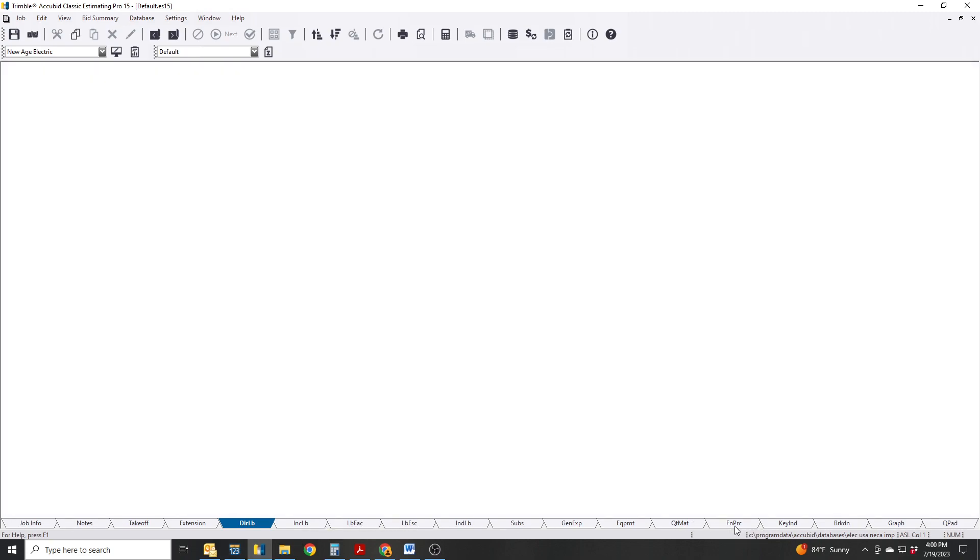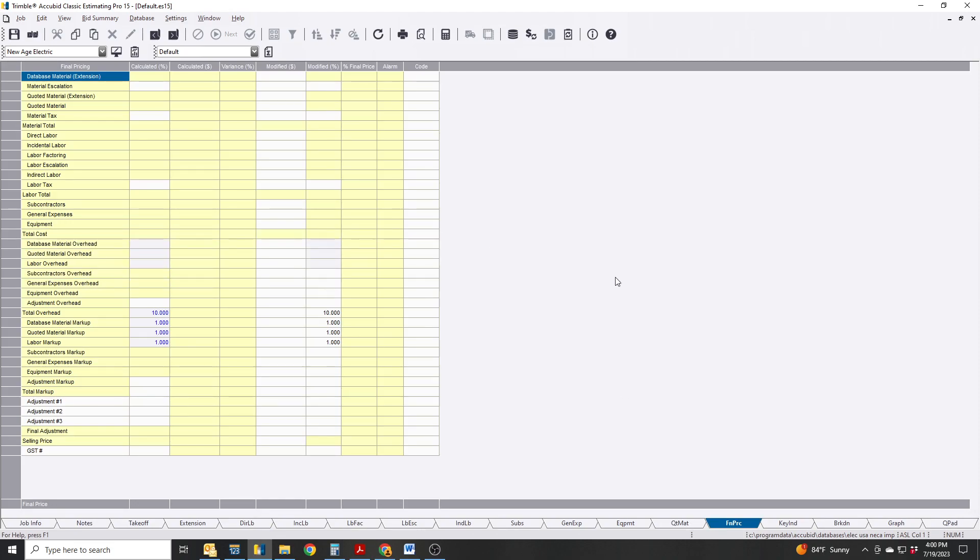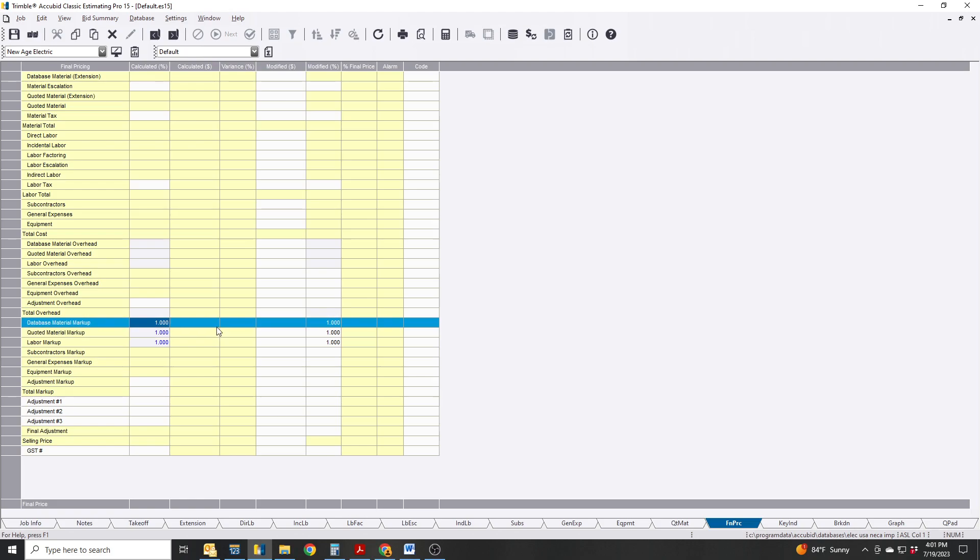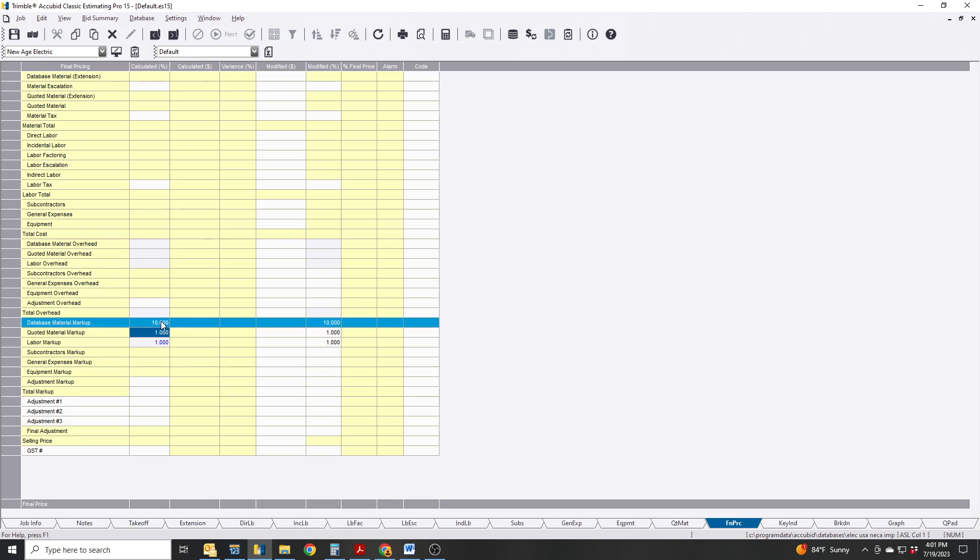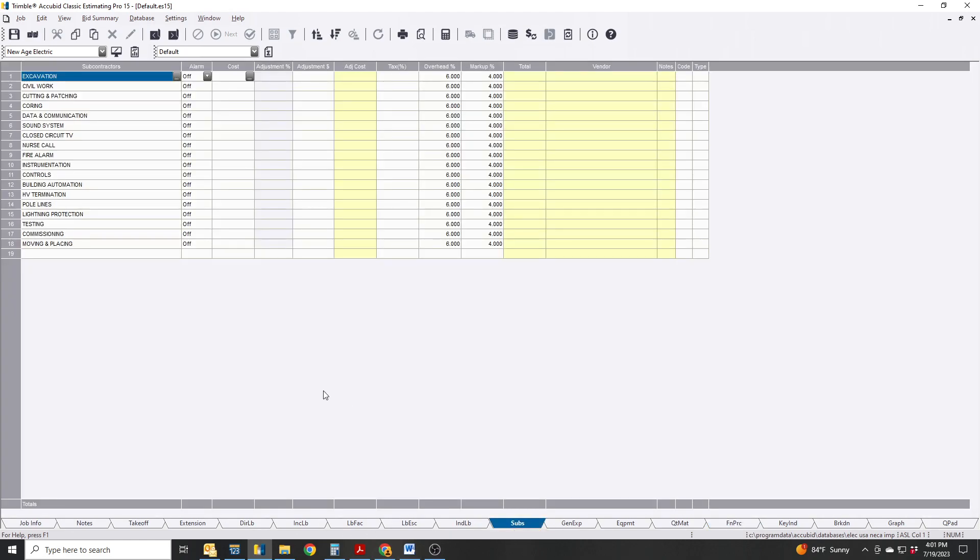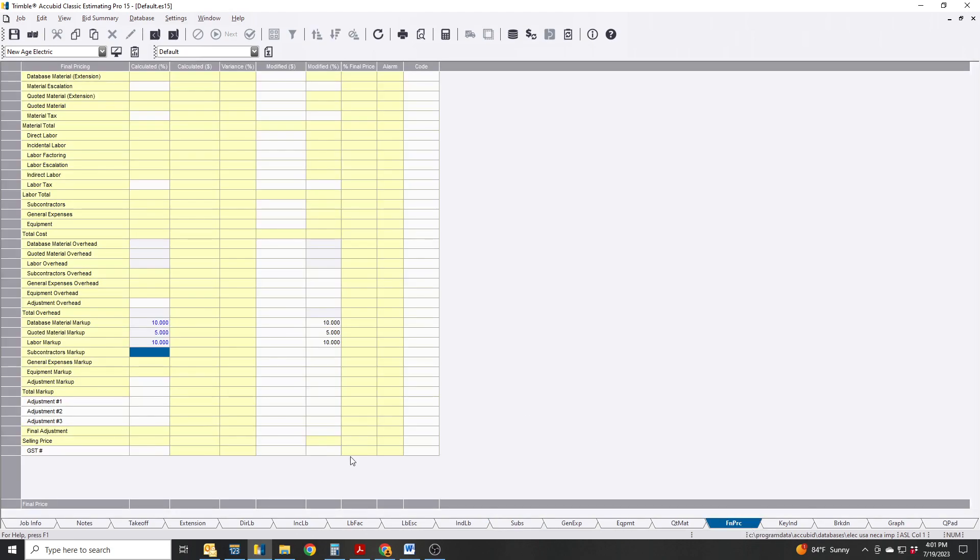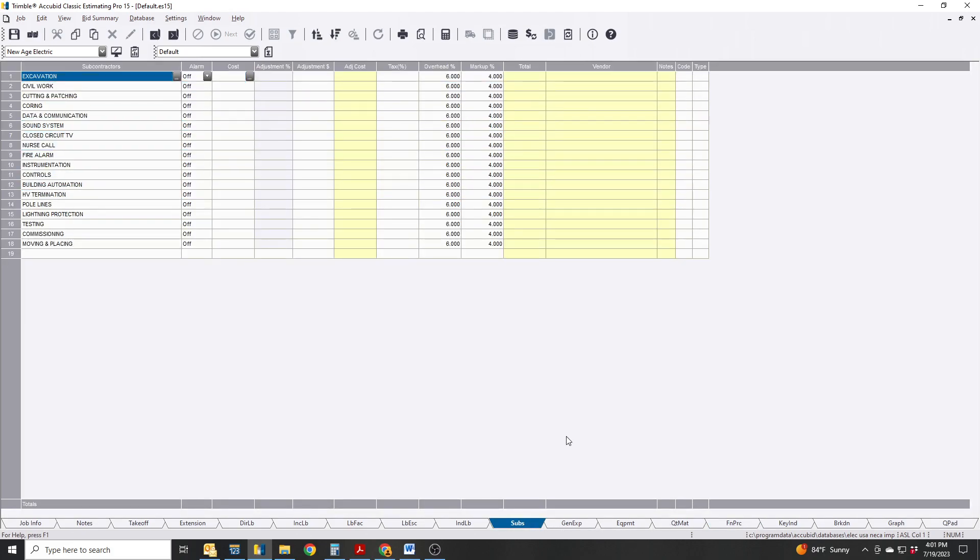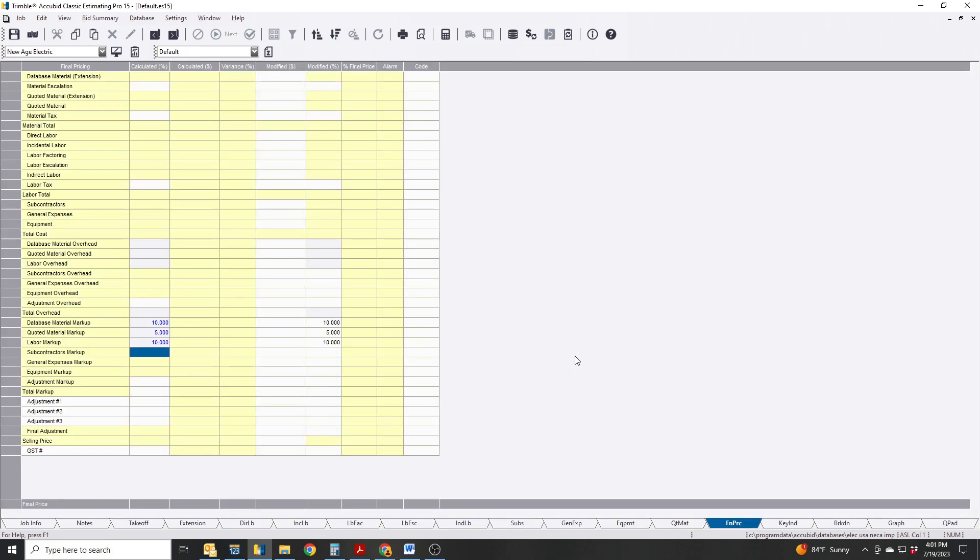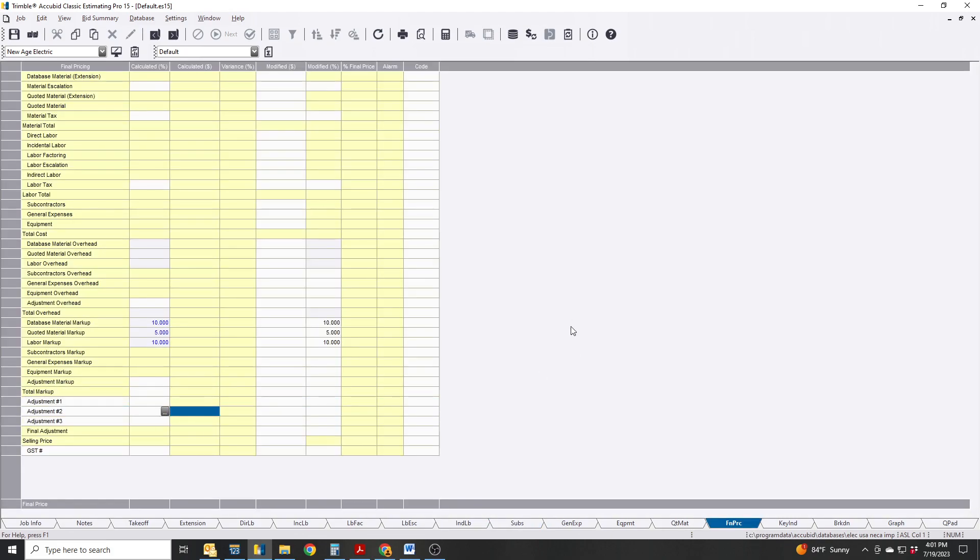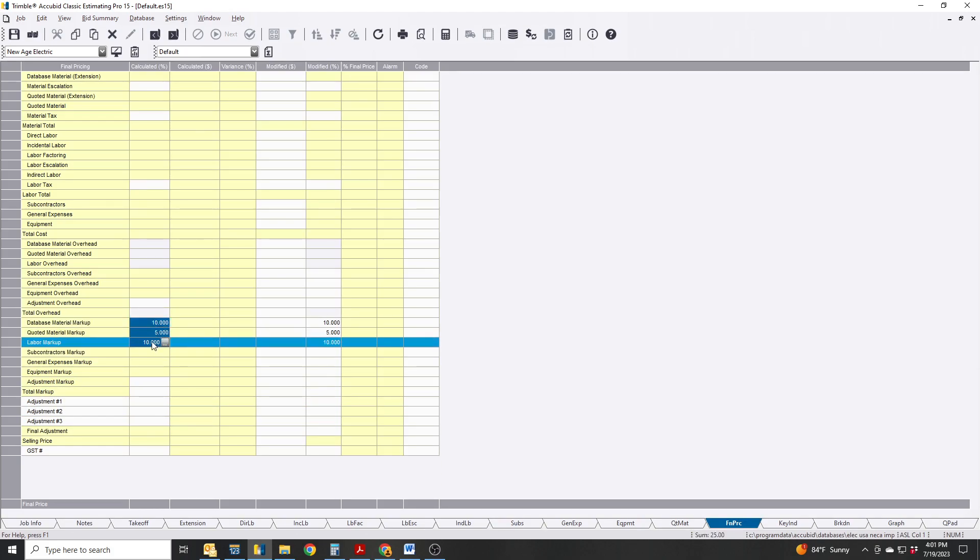Final pricing - let's say your company doesn't do overhead, and everything is marked up. Database material, quarter material markup - let's just say they bid everything 10% markup for database, 5% for that, and 10% labor and subs. You can change this if you want, or this will override these over here which is 10% overall anyway. And then that way this is now set as a default, or you can call it the master default.